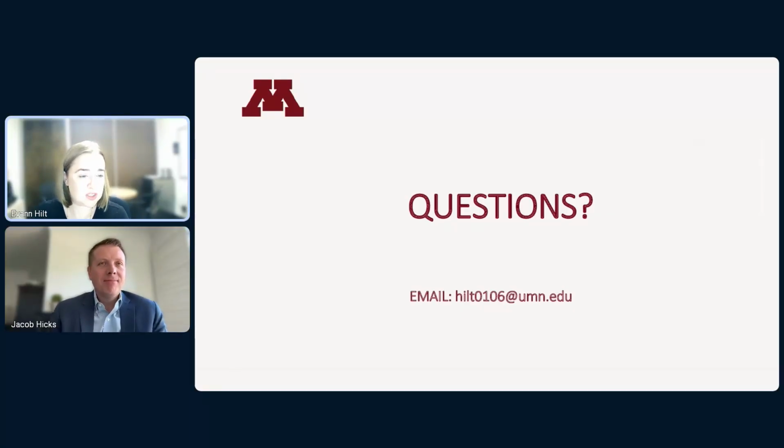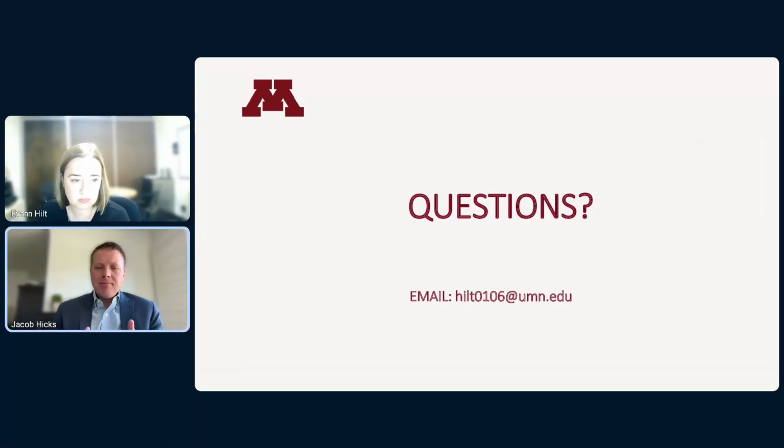That is an excellent question. I think as with all technologies and assays, the actual discussions of if this will work or not, and getting instrumentation in, took probably about a year. But once we had all the pieces in place, I would say probably about 9 months. Yes, and that seems to be maybe a middle-of-the-road average implementation timeline. We've had some go as fast as 60 days, once the instruments arrive and they had their samples ready and they just went. But yes, it's a good question. And some have been significantly longer than that.